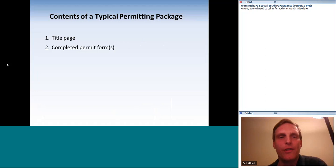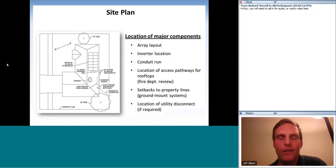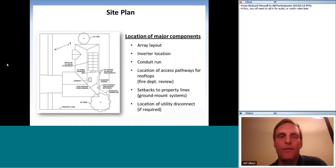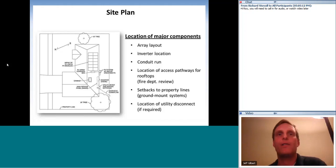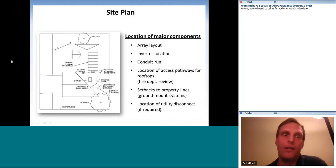The next item is the site plan showing all major components: array layout, inverter location, conduit run, location of access pathways on the rooftop, any setbacks from property lines for ground mounts, and the location of utility disconnect if required. In the old days we drew by hand; now everyone can produce a drawing using Google SketchUp, which is free and simple — you can create plans like this in about 15 minutes.